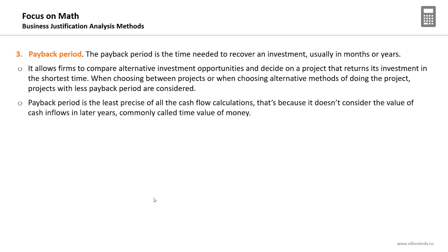Payback period is considered the least precise of all the cash flow calculations. The reason behind that is it does not consider the value of cash inflows in later years, commonly called the time value of money.